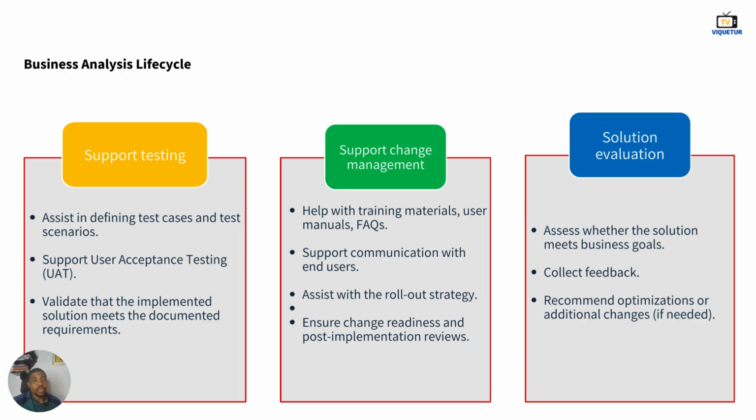Test cases are what QA guys use to test different features or your user stories, right? And you're now ensuring that you're mapping each requirement to a test case. That is traceability and test scenarios. Then in most cases, you are the one supporting user acceptance testing. You are organizing demos, you are facilitating UATs, you are pushing for profiling of your stakeholders or your users on your platform so they can test, and you're getting test feedback and results as well.